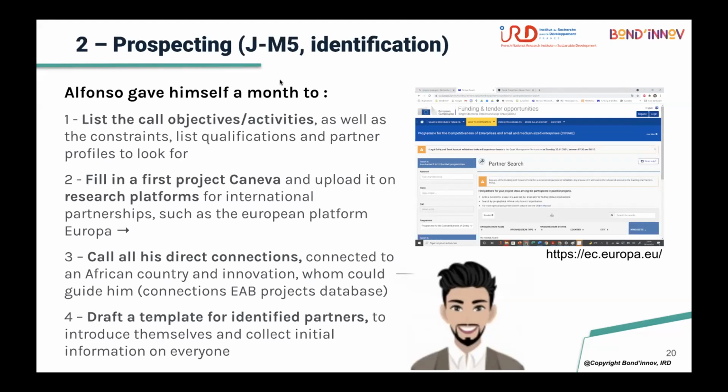So usually you can define a kind of partner description, where you can have the institutions, the contact persons, the expertise, the experience of the institution, etc. You can provide a kind of template, you know, to ask your identified partners to fill. And from these documents, you can decide later if you will engage them in your consortium or not.